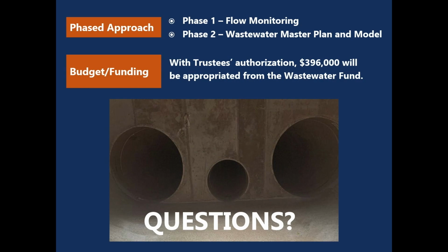One, we want to capture that wet weather data, but also we really want to capture data while the students are still here. And so if we deploy flow monitors around the 15th of April, then we can have maybe 3 weeks of flow monitoring while the majority of, or a good portion of our town is still here before they go home for the summer.